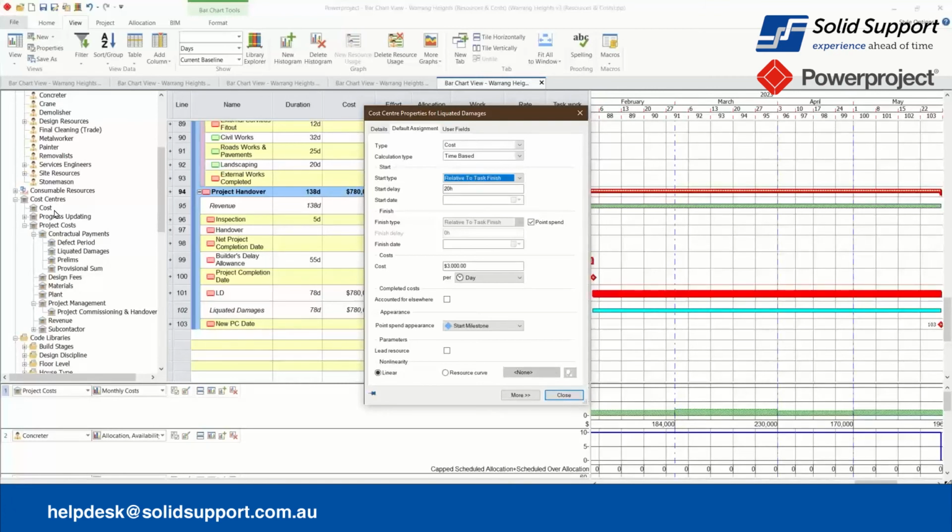I can also adjust the accrual period to point spend, which is a single payment, or resource curve allocations, where the payments vary over time. You could do things like an S curve, a normal distribution, or a triangular one. I'm going to quickly show you some of it. If you're linear, you have offset triangles. So we have a lot of different resource curves, and you can even make your own resource curve to assign.